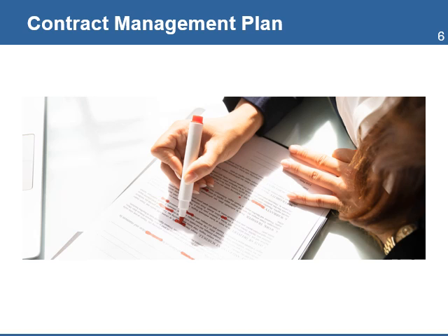If you identify the need for changes, then you need to document your justification, which will include information to support your request. In some cases, this process might require the intervention of the legal office or an attorney that provides services to the organization. Changes to the document may come as supplements or addendums that will become part of the contract.